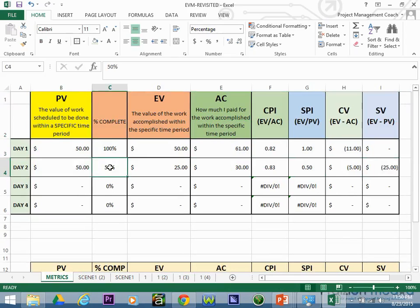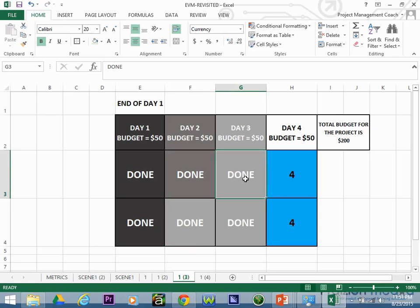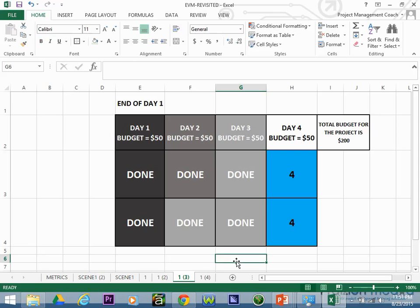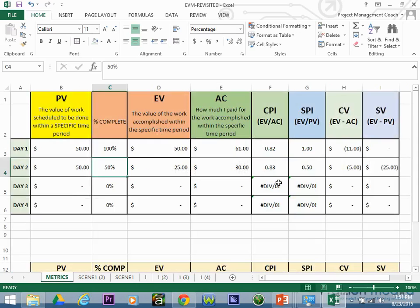On day three, some additional work got done. I'll leave it up to you to calculate the EV — if the actual cost at the end of day three is eighty dollars, what do the metrics look like? Put those numbers into the table and see what you come out with. This has been a brief tutorial, not meant to be all-encompassing, but I hope it gives you a good idea of what to expect on your exam. All the best.